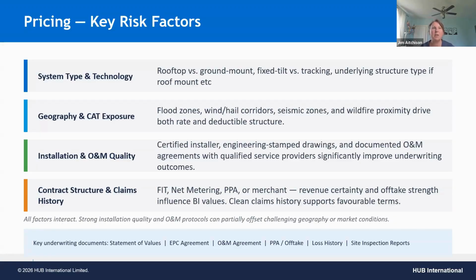References are great, but understanding if there's been any liability claims against a contractor is also really helpful. And we've sometimes seen it come up in RFPs where it asks if the contractor has been involved in any litigation. You'll likely start to find that that language has shifted to requesting a loss run, because insurance claims aren't necessarily always stemming from litigation. They sometimes do, but sometimes it's simply a written demand, a root cause analysis, and maybe it's a subrogation. So contract structure and claims history all matter.